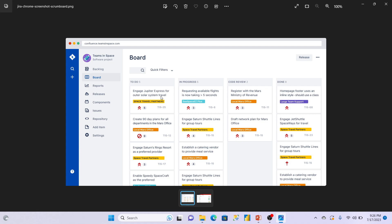When you create a subtask — for example, 'Create Power BI report' — at the time of creation it will be in To Do. When you start creating, you drag it to In Progress. In the subtask, there is an original estimate and a time log where you log your time. For example, today it took six hours; tomorrow it took eight more hours — it stays In Progress. After completion of the report, after internal and external reviews from your managers, when you hand the report to the QA team, they raise observations, you solve them, show to the client, and the client gives a green signal — then you drag the subtask from In Progress to Done.